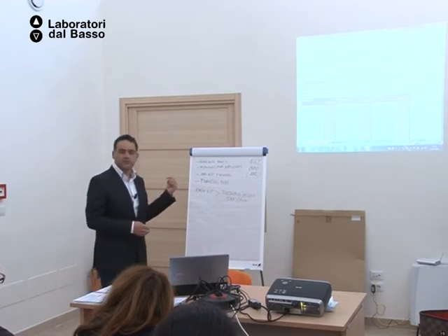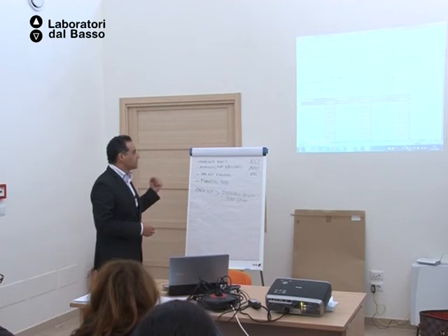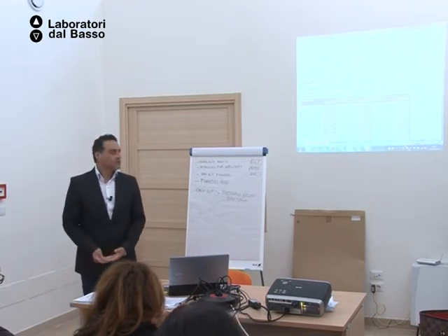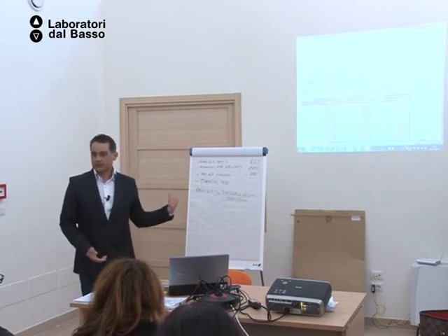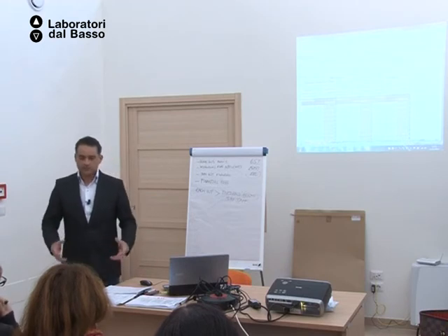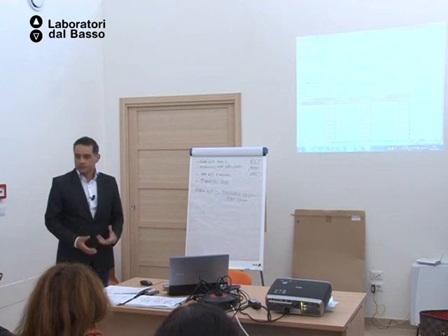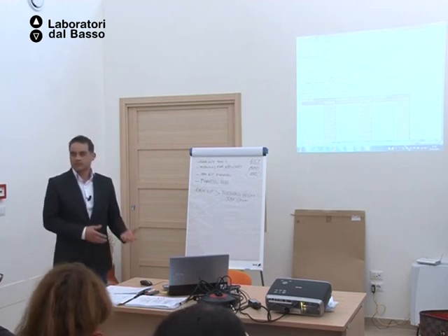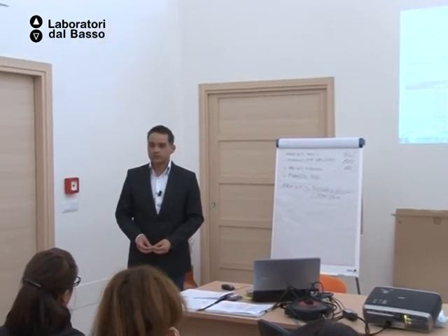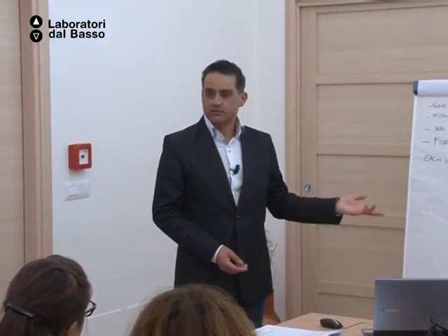So in some projects, for example, when you have a work package on quality management, and if the work package is mine, I'll be the only one dealing with the work package eventually, and I'll be in all categories, because at some point I will be a manager to manage the work package, at some point I will be a researcher or a trainer, at some point, in this case it would not fit any equipment, but at some point I will be also an administrative person, so I will apply the cost according to the function, even if my salary is actually maybe more linked to the first category. Do you understand what I mean? Here it's a question of function, task, activity. But it doesn't mean that it must be four different people. All right?